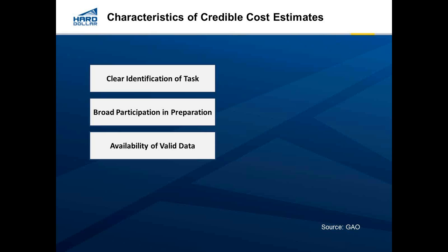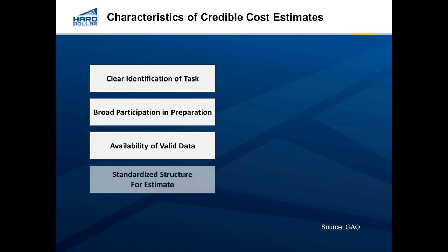So that is the collecting and the storing of past projects, past work that's been done, where we can look at it in detail and reuse that information and play smart about the assumptions that we're coming up with. There needs to be a standardized structure for the estimate. A lot of times things get assumed and are estimated at too broad of a level.